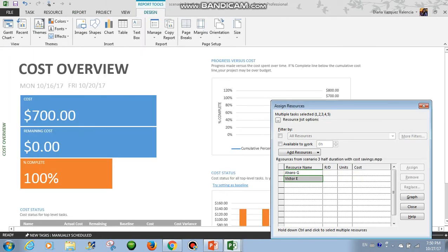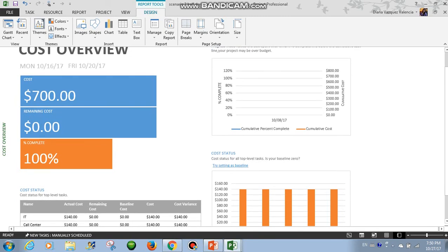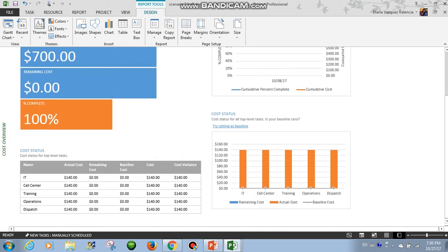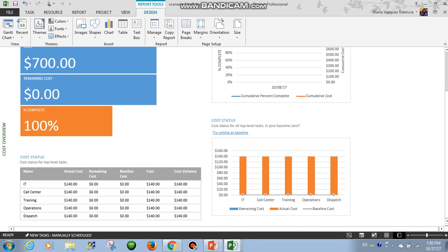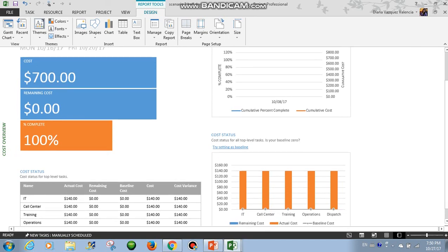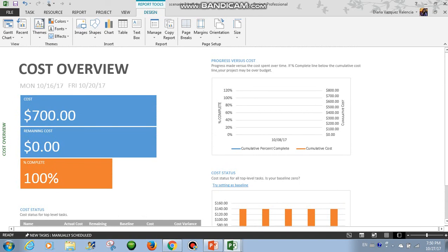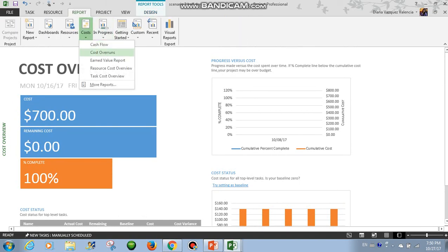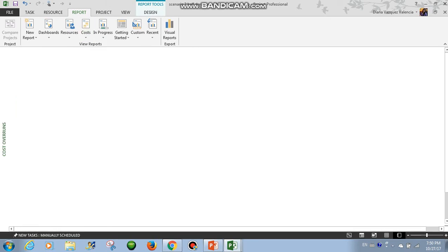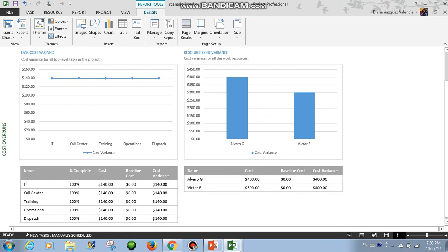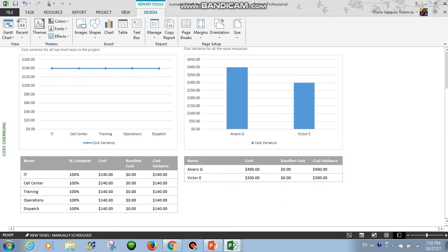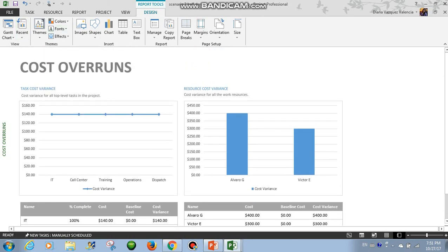And let's see the report — we expect to have savings. So we save $100 here because now the cost of the task for Victor is $104, so it's a little bit less than the baseline. Let's see the resources. We completed the same work with less money because we are using a resource that is less expensive. And well, that's everything for this video. Thank you for watching. In the next video, we will keep working on cost variance. Have a great day.